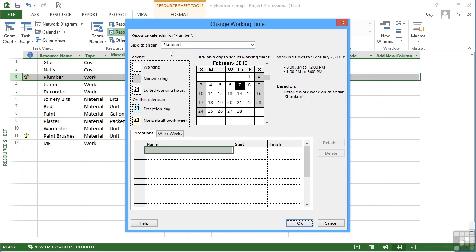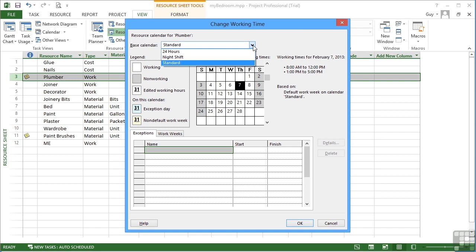You'll see that we can change, firstly, the plumber's base calendar from the standard, which is the default that we've been altering, to either one of the other two built-in base calendars, which is the 24-hour calendar and the night shift calendar. That will then mean that the plumber inherits those working hours and therefore that availability.